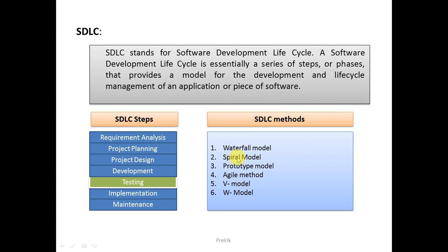The waterfall model is a very old and ancient development model, and it's basically a sequential model. So what is sequential? It's a sequence. First requirement analysis will happen, then project planning, then project designing, then development, testing, implementation, maintenance. So it's one by one. Once you have passed one phase, like if you have passed requirement analysis and started working on project planning, then in the waterfall model you cannot go back and you cannot make any changes if the requirement changes further.